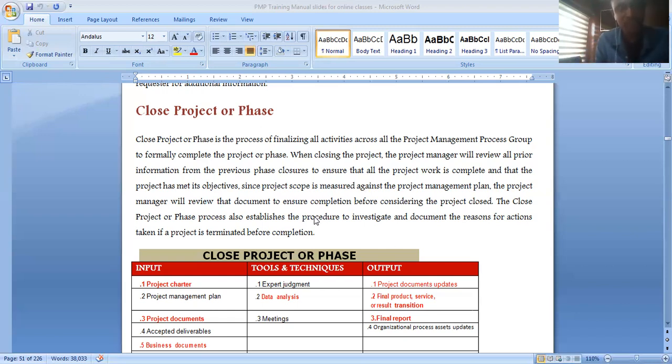When you look at your project management plan and what you have done, you may see changes, right? So you want to be sure that the change control management plan was incorporated. For all these changes that I'm seeing in my project, were they accepted by the owner? Were they accepted by the client? Did we follow the right processes to incorporate them?